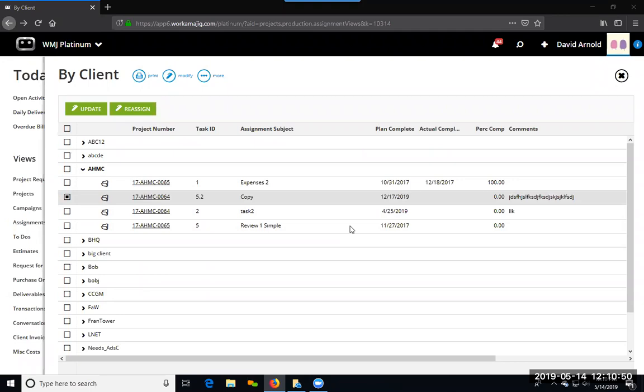Even if you pre-assign it to a task, and that's back to the advanced billing. Yes, even if you pre-assign it to a task on the revenue invoice, the revenue did go to the task, but it's pulling from a bucket. The advanced bill is more of a bucket rather than a detail towards that task.